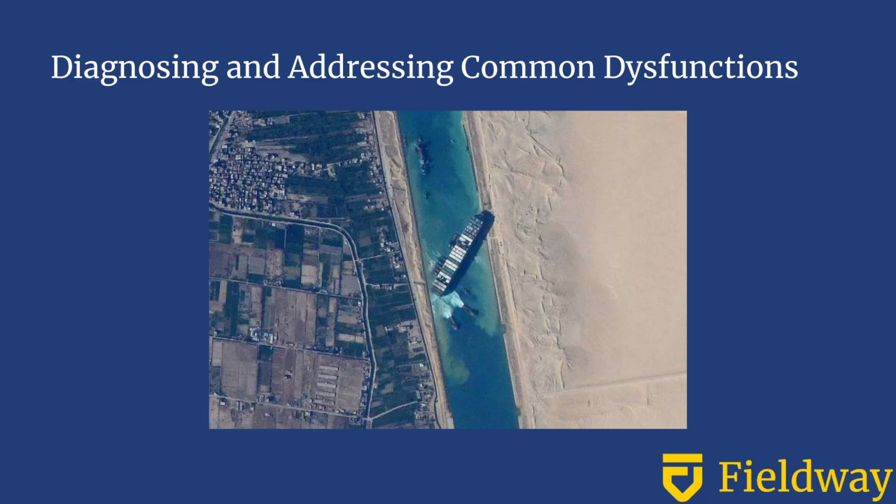Another common dysfunction is the overly detailed update. When someone starts diving into technical specifics that don't benefit the whole team, gently redirect them. You might say, "Let's focus on outcomes and blockers in stand-up, and we can discuss implementation details right after."